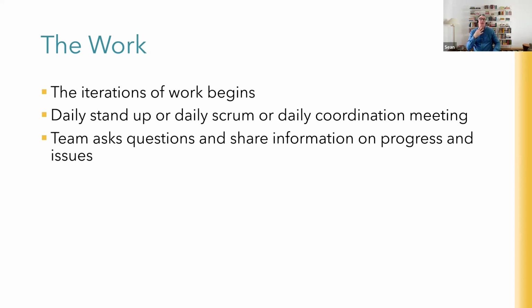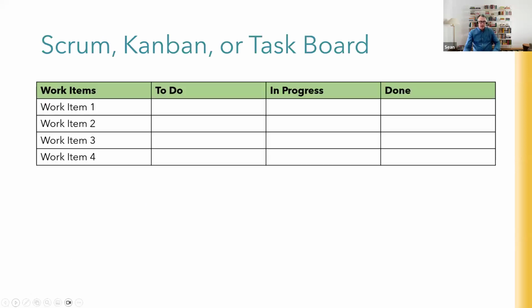You may have heard of these questions, something like, what did you achieve yesterday? What are you planning on achieving today? And what's stopping you? And their job is to resolve that last question. But it's not about the Kanban board, which is for visual updates. It's about talking about the things that you need resolved and how progress is going. Very short meetings. I like bringing this concept to any project or any meeting, to be honest. So that's the work. It's underway.